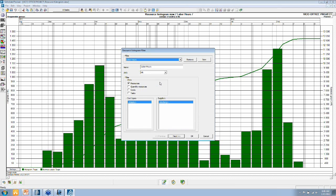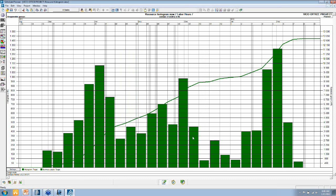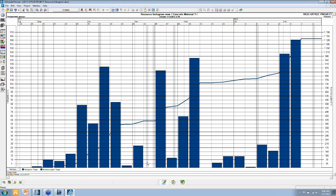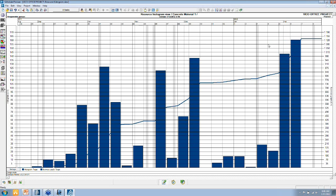Let's look at another example. I created a filter for concrete materials. So it's pretty helpful to see what the demand for concrete material on site is per week. There are weeks where no concrete deliveries are needed at all, weeks 45 and week 50. But in week 6 of 2012 in February, I see that I need 160 cubic yards to be delivered to the site. And this is the total number of concrete that I need.